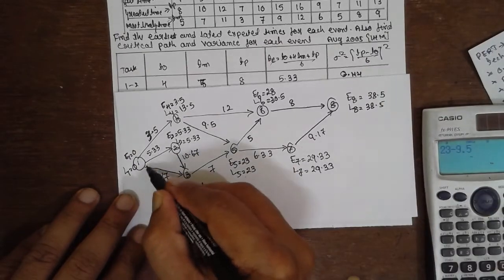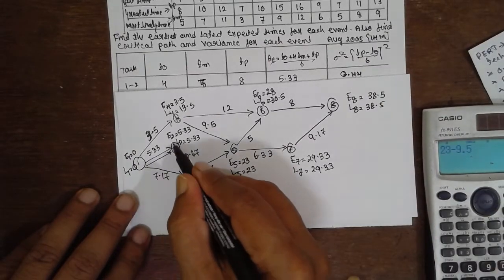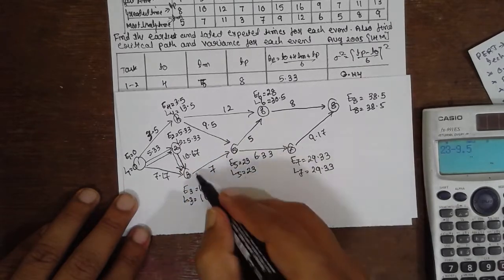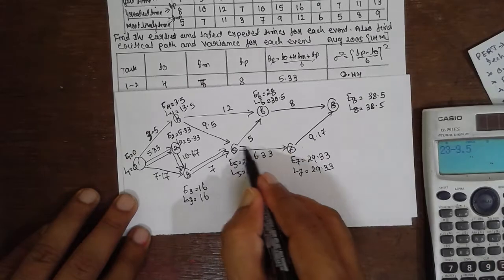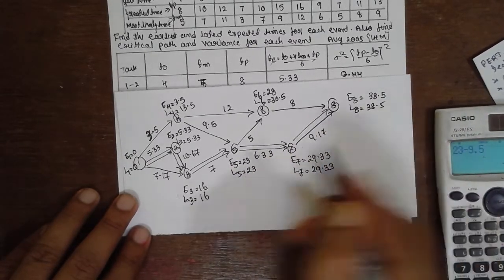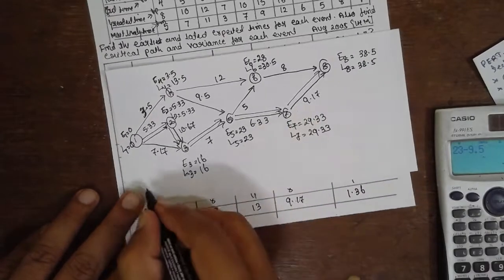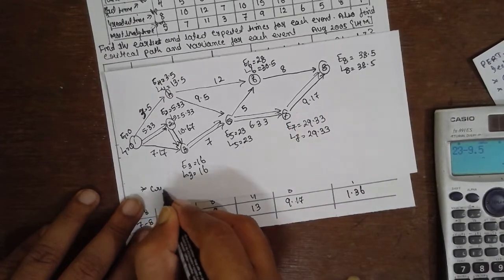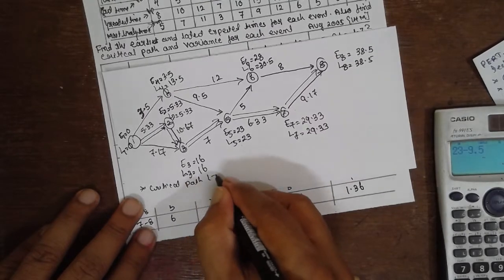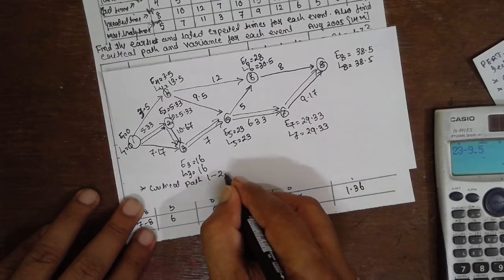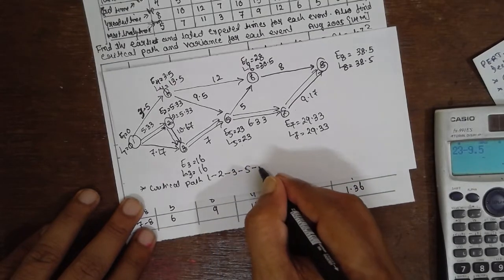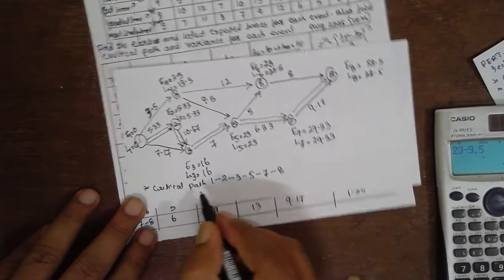Go for the critical path — where E and L values are equal. The matching pairs are: 0 and 0, 5.33, 16 and 16, 23 and 23, 29 and 29, 38 and 38. The critical path is 1-2-3-5-7-8.